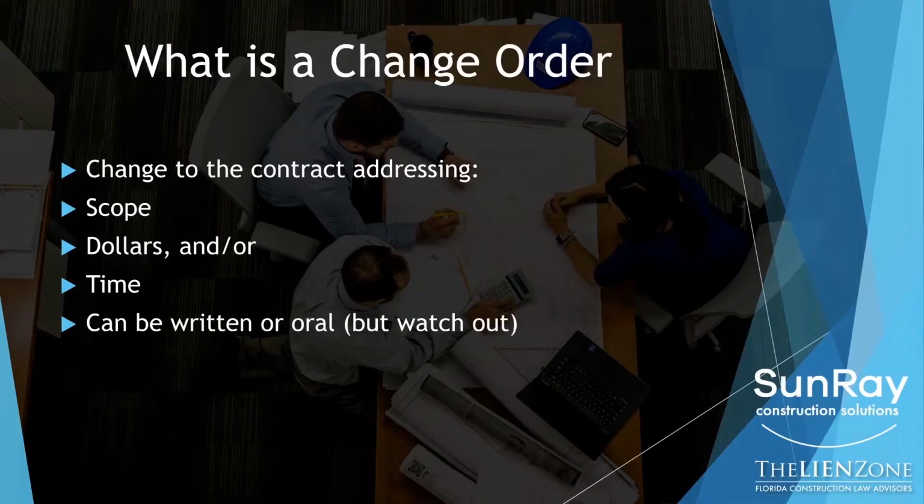It can be written, but it also can be oral, meaning that you get a verbal directive to proceed with a change. That is a valid change to a contract, depending on what your underlying contract says. Many contracts say that only written, signed change orders are valid. So if that's the case, be aware that if someone tells you to do something without a written change order, you may be hard-pressed to prove that it is a valid change order. You always would like to have it in writing, because then it avoids any confusion later about what parties agree to as part of the change.